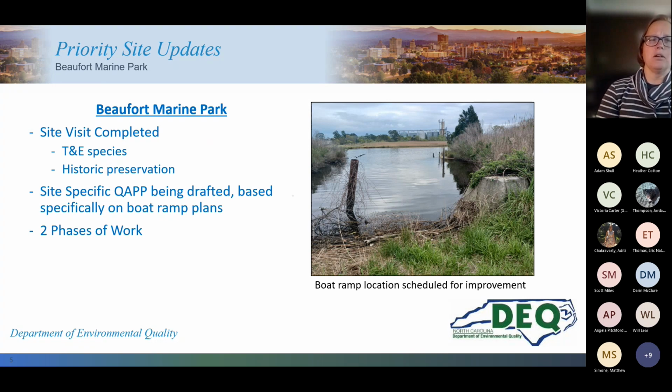This is another requirement of EPA to make sure that our site work and our assessment is not going to impact either threatened and endangered species or any historic sites. Now, this is not the end-all be-all for these evaluations. As you know, with federal dollars and construction, there may need to be some more detailed reviews once you get into construction. But for the site assessment, it's usually a preliminary overview to ensure just our soil borings and monitoring wells won't affect these potential resources.